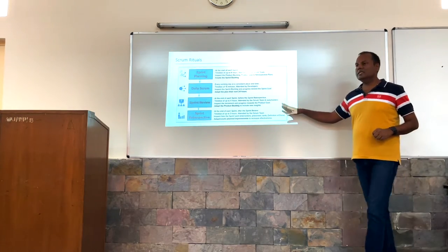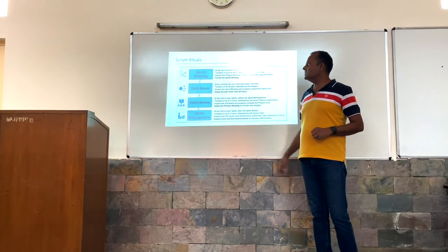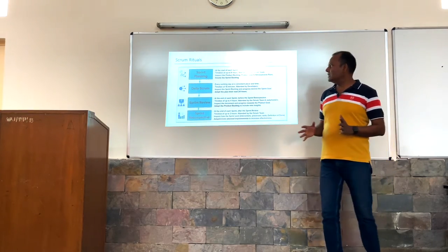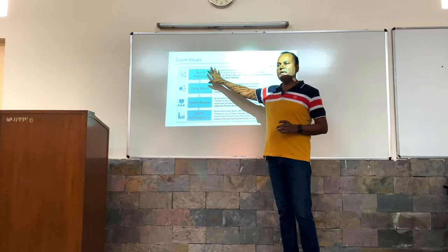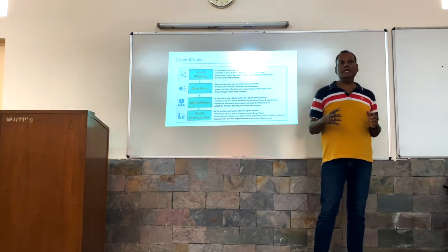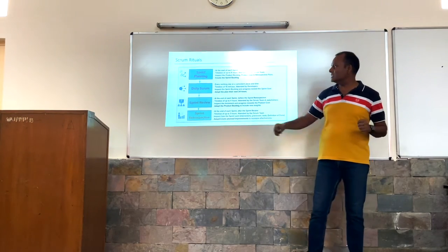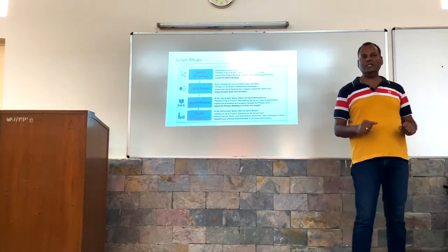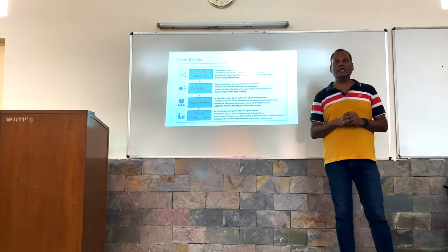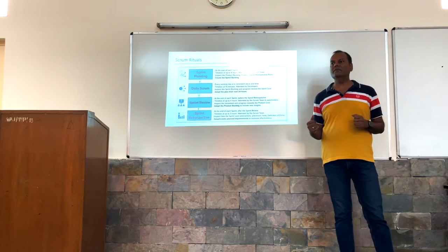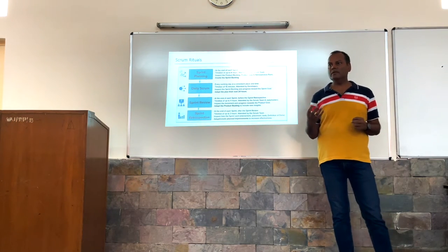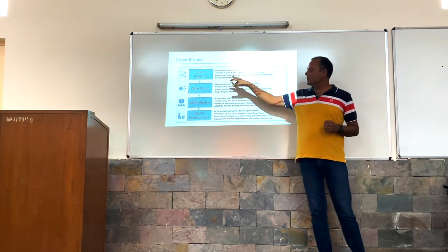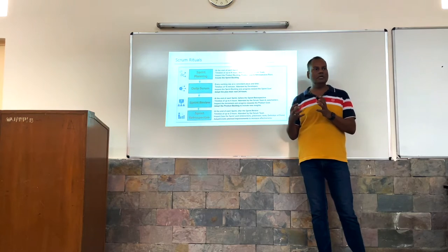So these are the rituals in Scrum. There are four rituals in Scrum. Ritual means meeting. All the team members sit together and start doing meetings. They start with the sprint planning meeting. Suppose my company decides, okay, we will have a 15-day sprint. At the start of the sprint, we first do the sprint planning meeting. All the team members sit together in one place and we discuss what things we are going to deliver in the next 15 days, what things provide more value to any user, and what the complexity behind those requirements is.